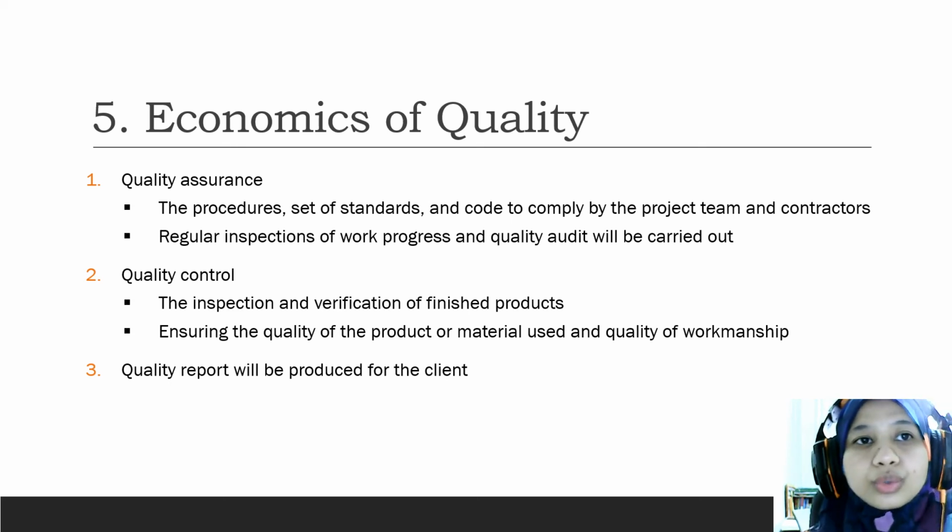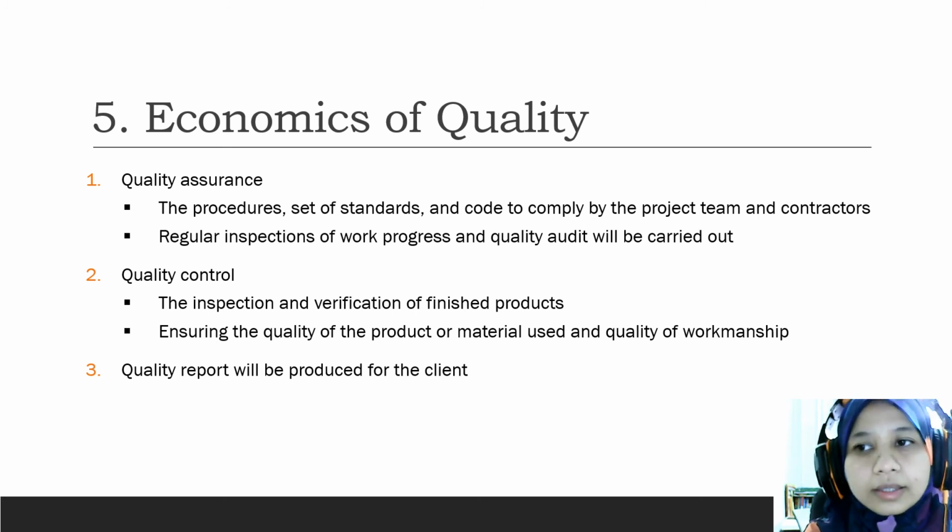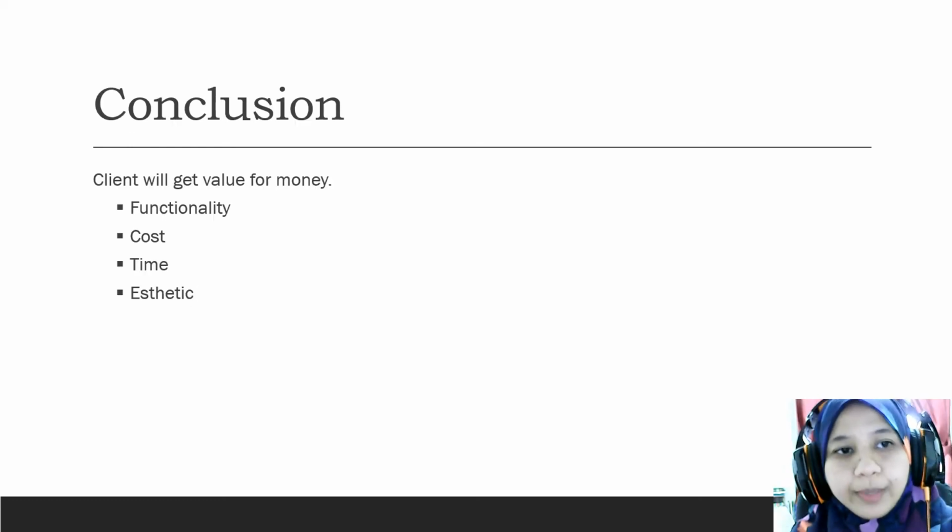So to achieve this quality, the contractor must produce the manufacturer's certification, test certificate and approval certificate to the project supervisor. Testing and commissioning will be conducted throughout the project. The quality report will also be produced to the client so that they will be aware of the quality of the bungalow house.